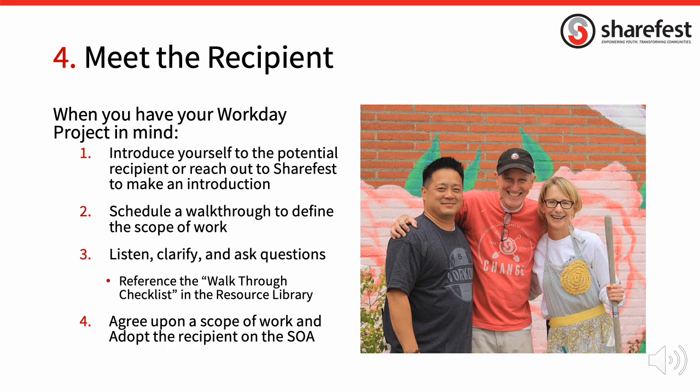Once you've determined what your perfect project site looks like, you may comb through our list of submissions and find a project that appeals to you. Once you've done so, set up a walkthrough with the recipient. This is extremely important if this is a new site for you and will help allow you to familiarize yourself with the site and determine what you can realistically complete on the workday.